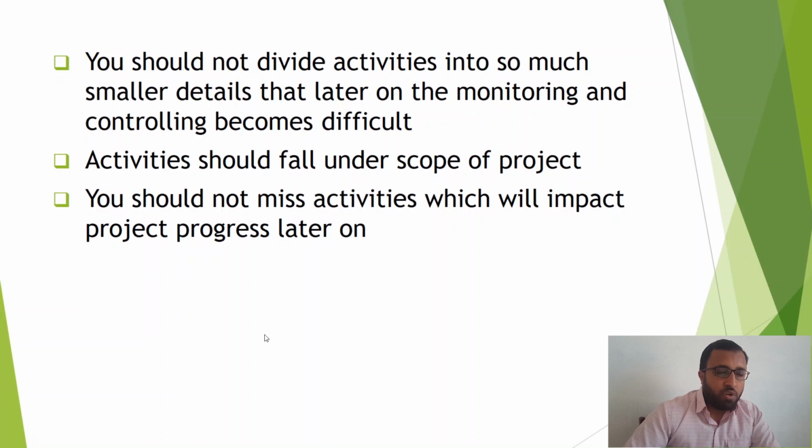Then, activities should fall under the scope of the project. I have seen in so many projects, and also so many schedules prepared by other planners, that when we start updating the schedule, some activities which have been added don't exist, so they are not present on the site. And sometimes the site team is working on some specific task that has not been included in the program.